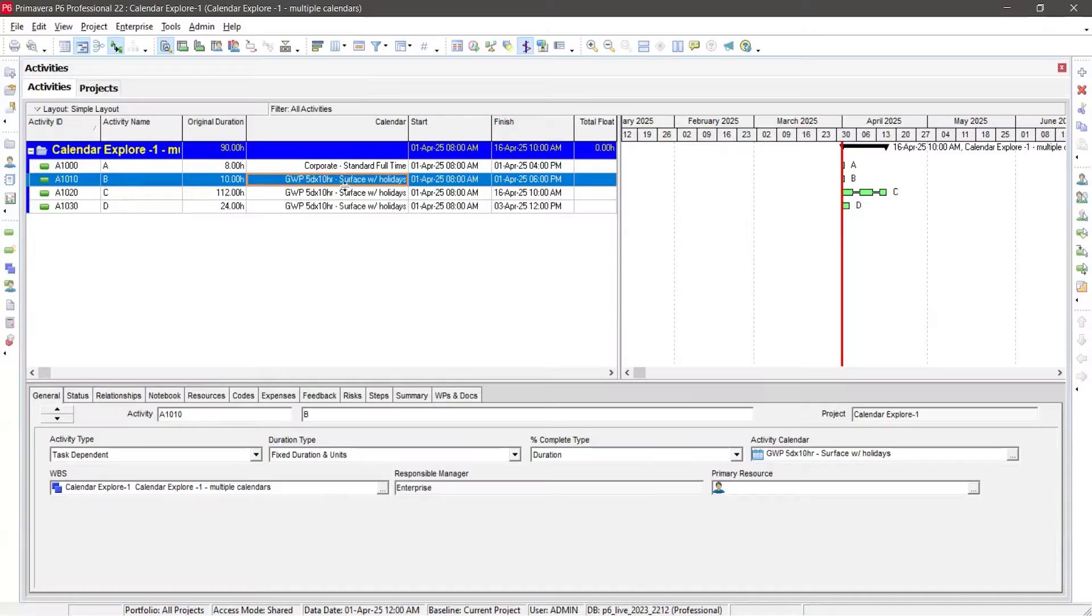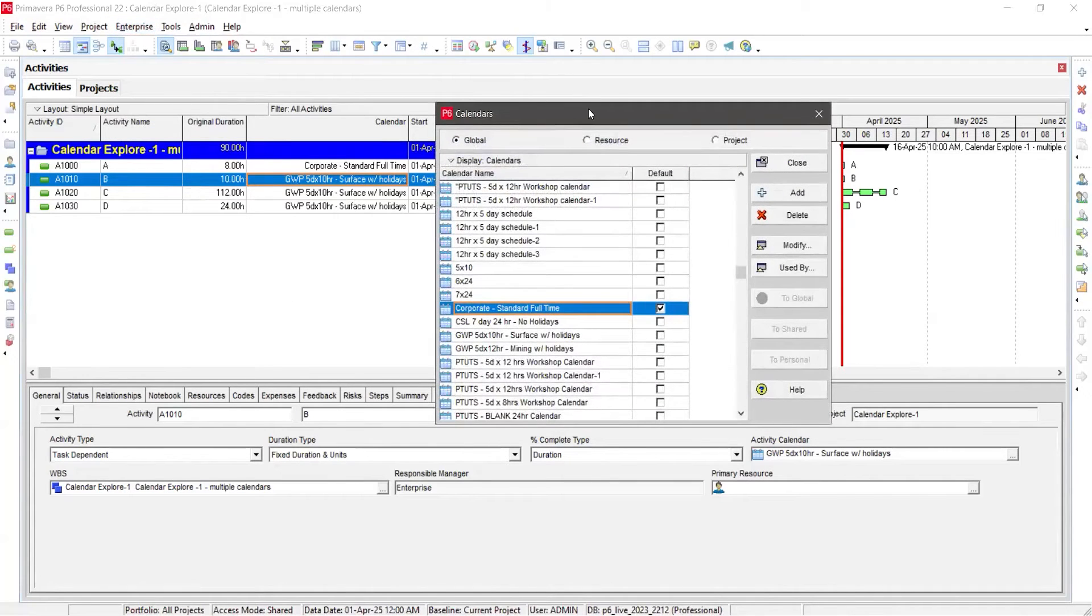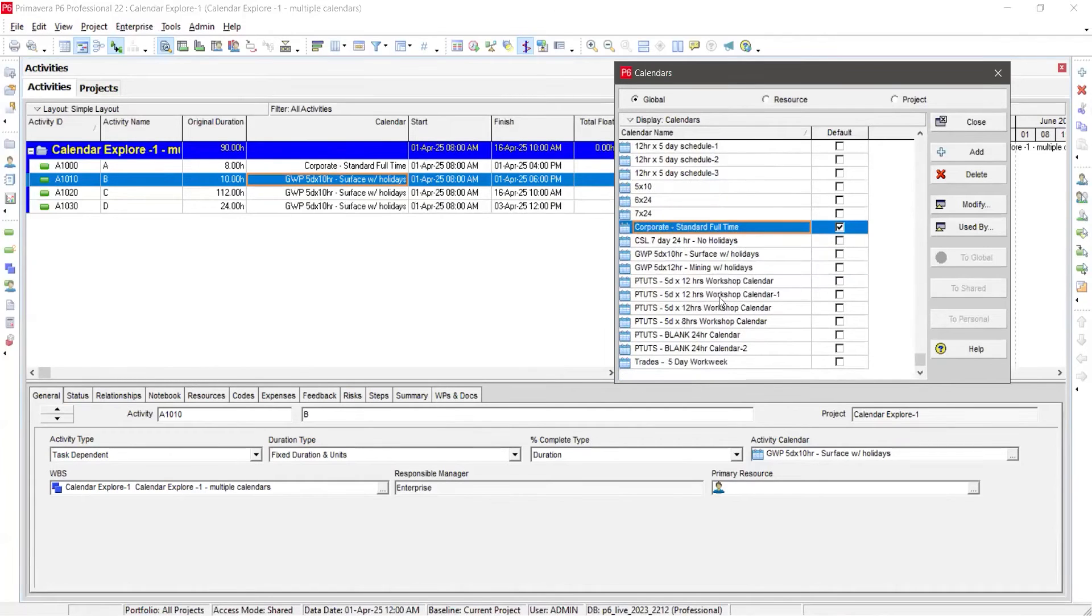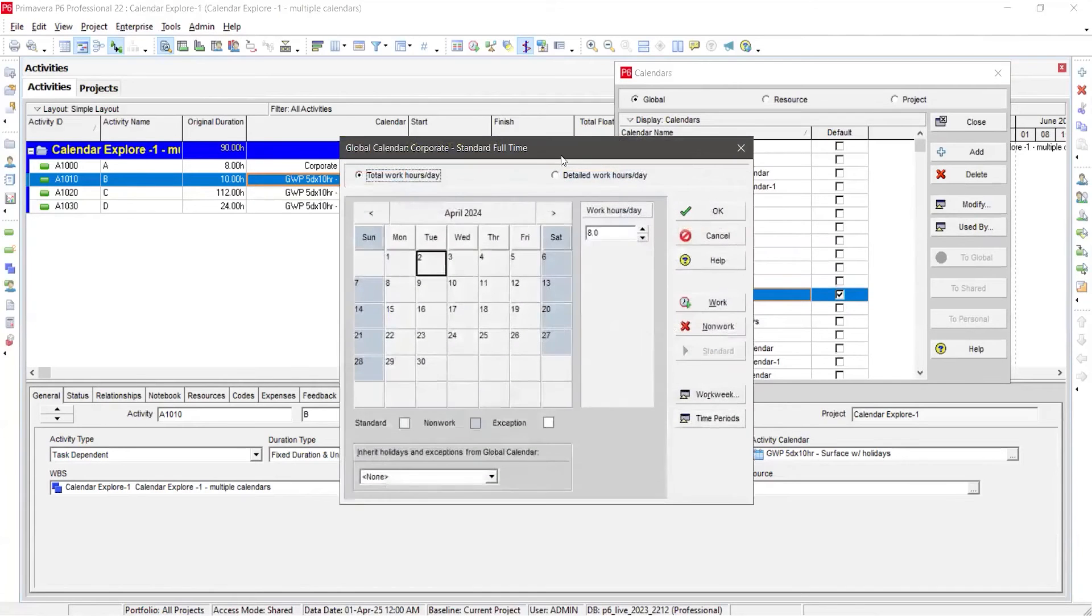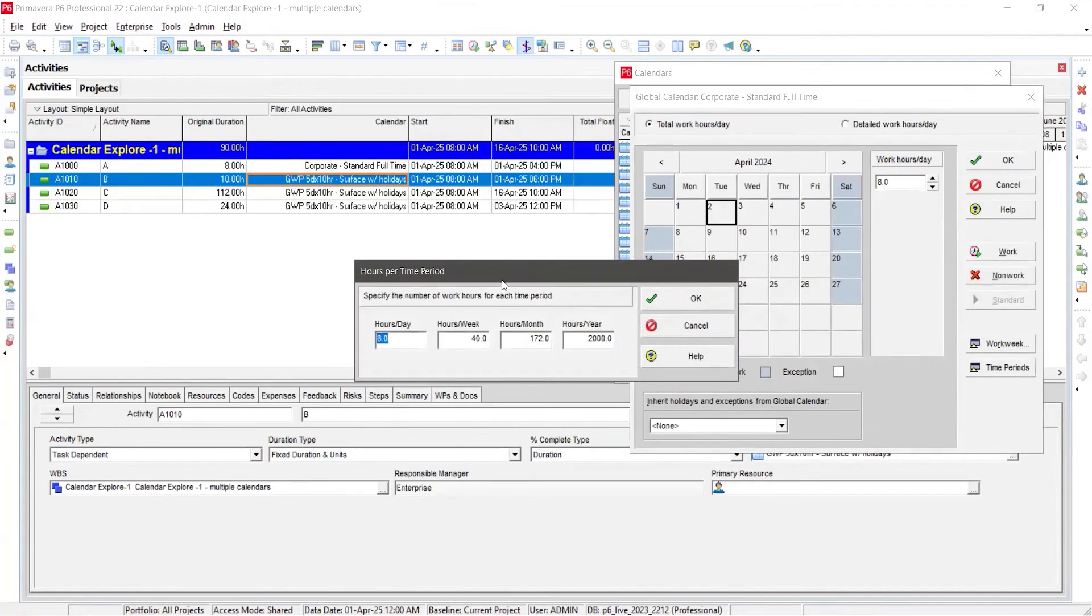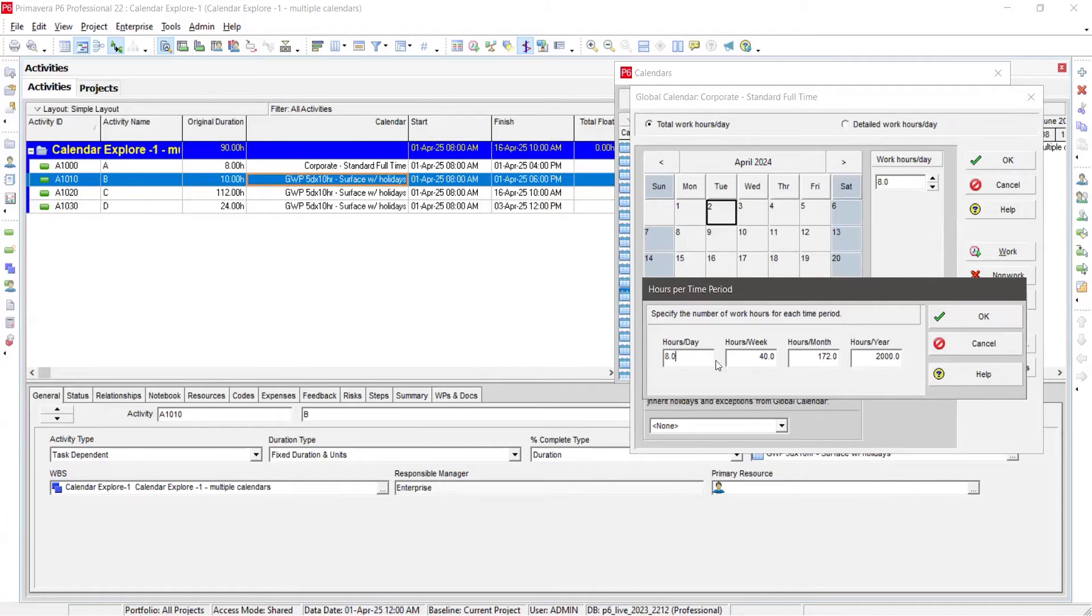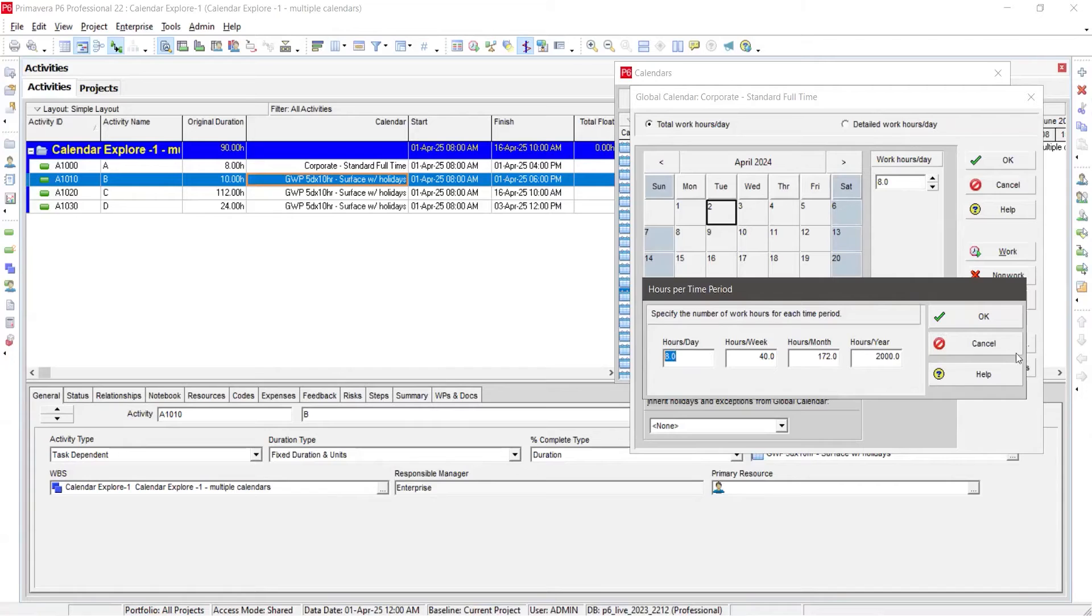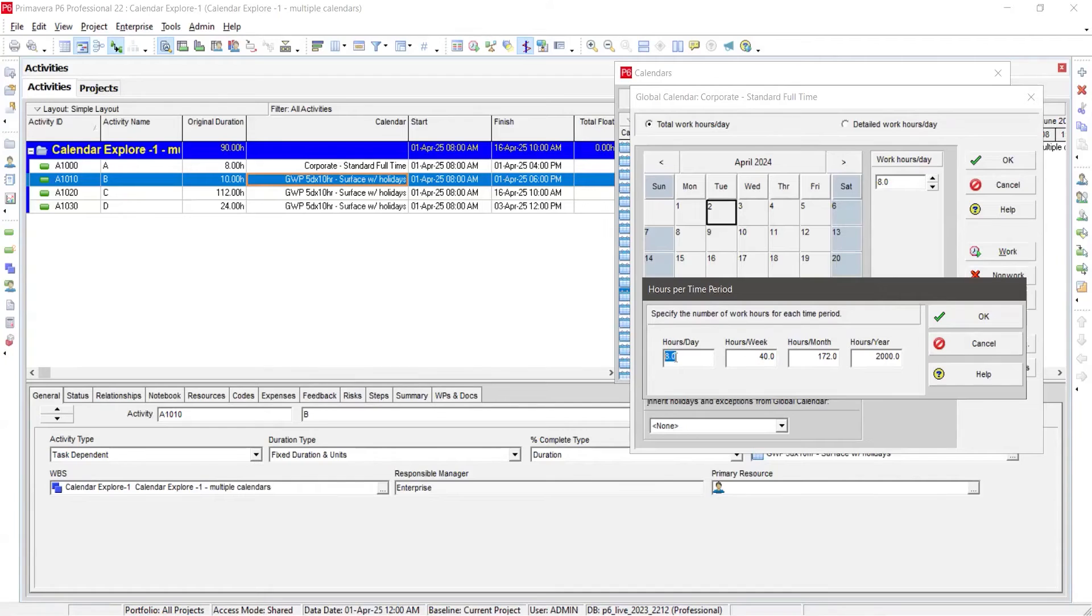So let's just review this one more time. Inside calendars, you can see how that conversion works. Let's see the corporate guy. Here he is, modify. It's on the time periods, but this right here, hours per day is your conversion factor. So when I type in one D, eight hours gets assigned. That's super important to notice. And a lot of time I see people make calendars and forget to set this and then you create a whole mess. If this is set to 10 and you think it's an eight hour calendar, big messy problem. Okay. So that's super important for us to know about.